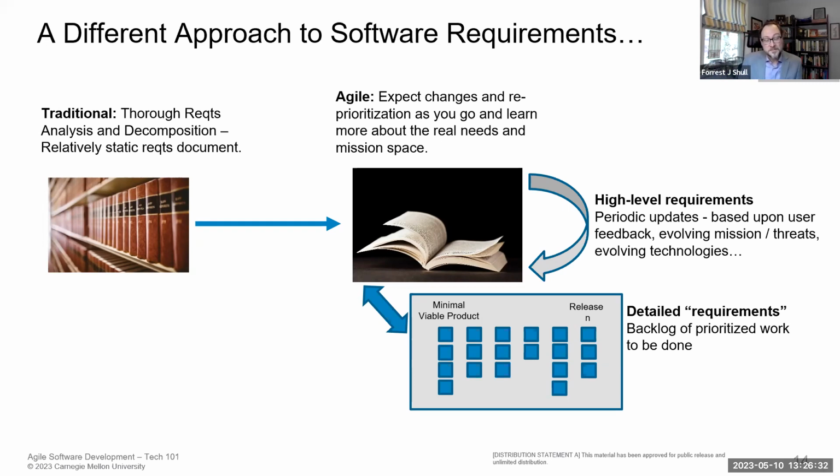One of the disadvantages of that, there are several, but one of the key ones is that it's very hard for me, even as I learn things as I go forward, to ever come back in and reflect that in the requirements. Because one of the key things about that left approach is that everything has to be traceable. Everything from my operational concept all the way down to those detailed requirements has to be a flow of logic that I can follow to make sure that at the end of the day, I'm satisfying the high level requirements by doing all the smaller requirements.